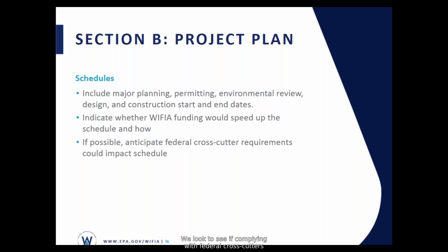if complying with federal cross-cutters would be a significant burden on your schedule. I know that your existing project schedules may not include federal cross-cutters like NEPA, but it would be great in your LOI response if you could let us know what you think the NEPA, Fish and Wildlife, and National Historic Preservation Act implications would be for your schedule. We do have resources in the handbook that help you figure out some of these implications. Some borrowers let us know that regardless of the schedule implications, they were okay with some delays because of compliance factors, which was helpful in our review.